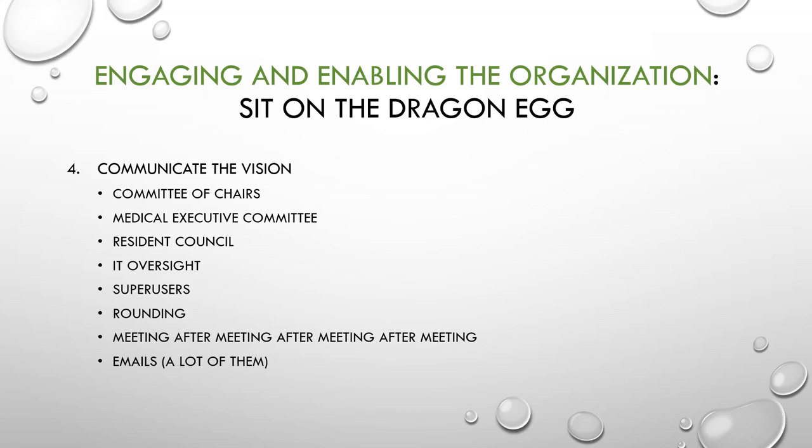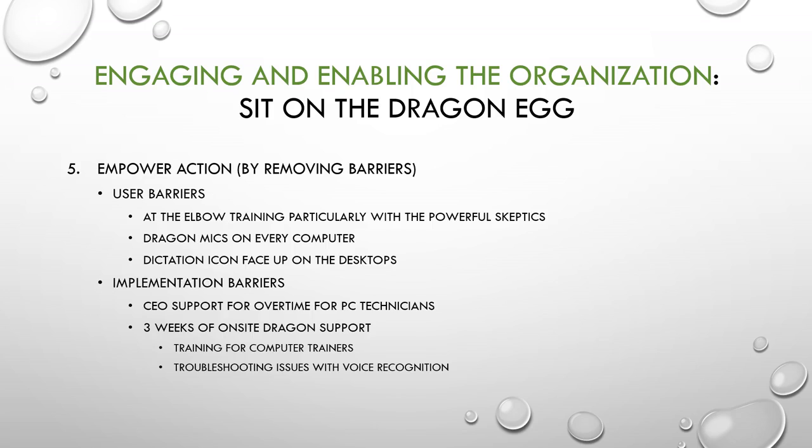We communicated this idea across many avenues and went to the committee of chairs and the med exec committee for all 3 of our hospitals, went to IT oversight and the resident council, and many, many emails and meetings and meetings and meetings, like weekly meetings for a year on this. But we got it to work.